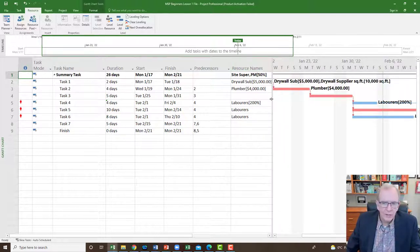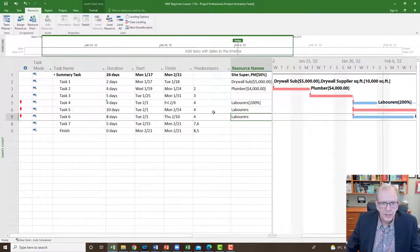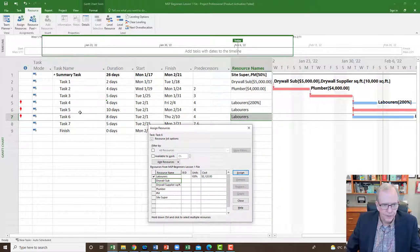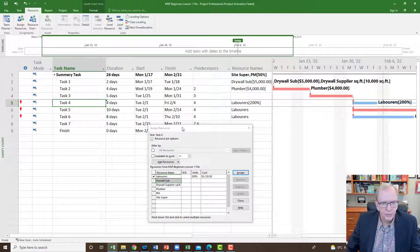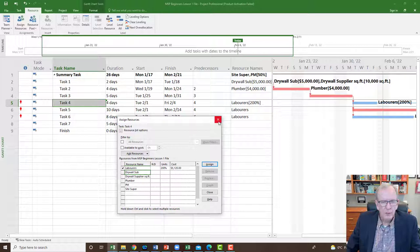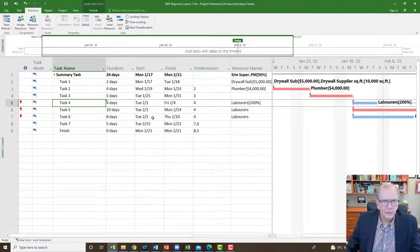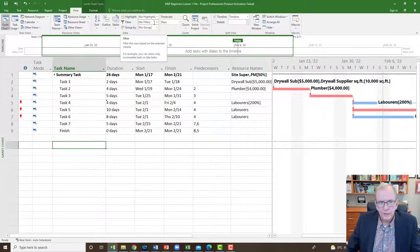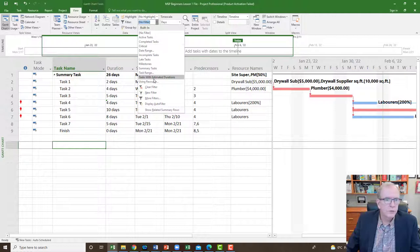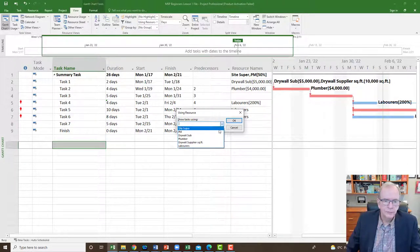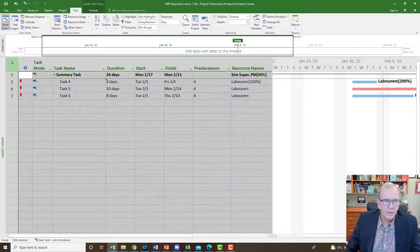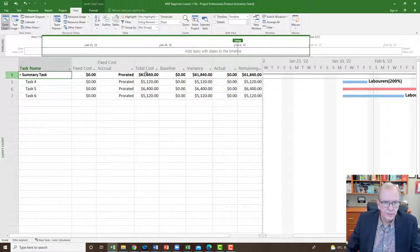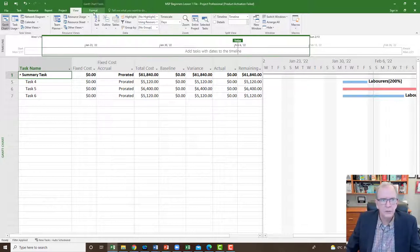You can also drill down — laborers appear on multiple activities at different amounts: $5,120, $6,400, $5,120. To see what laborers total across all tasks, go to the View tab and use the Filter option — 'Filter: Using Resource' and select Laborers. It shows only the labor-assigned tasks. Switch to the Cost tab and you can see them all together. I'd go to the Format tab to hide summary headings if I don't want them shown. Always remember when you've applied a filter, because you might come back and wonder where all your other tasks went.